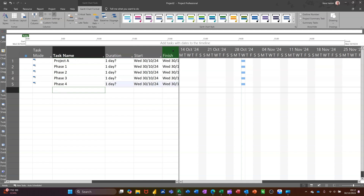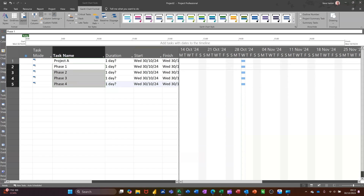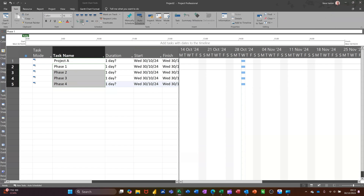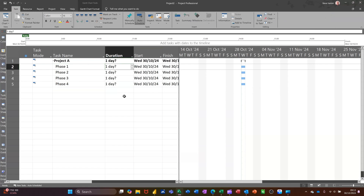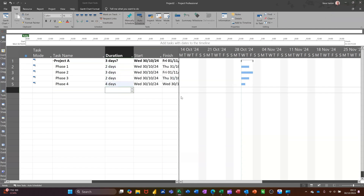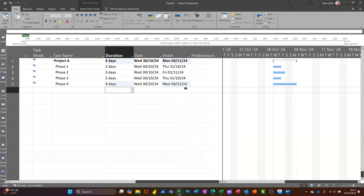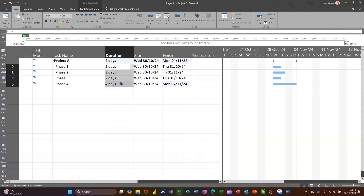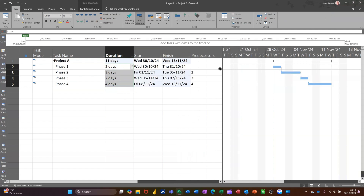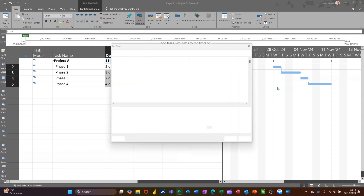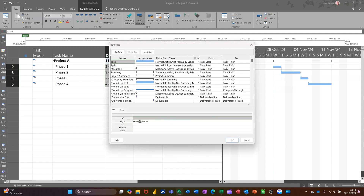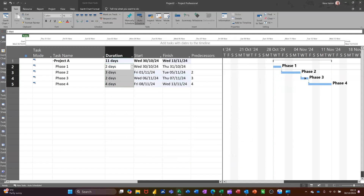You've got the timeline usually by default on the top of the Gantt chart — you can turn that off in options if you don't want it. Let me just do some indents here. Go back to the task tab and do some indents. I'll put some durations in: 2, 3, 2, 4. And let's just link these up with the chain link tool. Then I'll display the labels on the Gantt chart by going into text and typing in 'name' there.